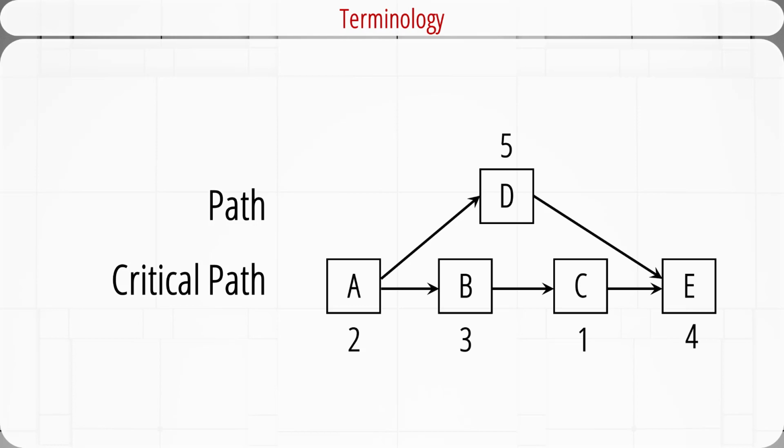A critical path is the longest path through the activity network from the beginning to the end that allows for the completion of all project-related activities. The critical path marks the shortest expected time in which the entire project can be completed. Delays on non-critical paths may not delay the entire project, but delays on the critical path will definitely delay completion of the entire project.